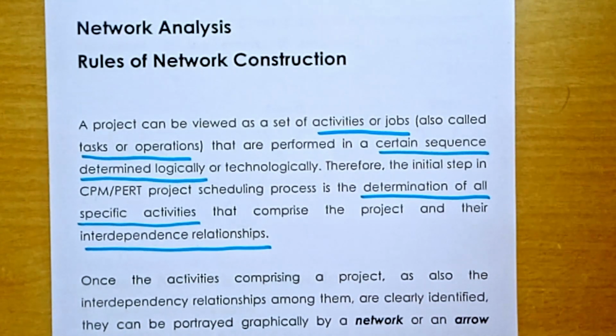Until and unless one activity is completed, you cannot start the next activity. Until and unless the material procurement activity is complete, you cannot start the laying foundation activity. Until and unless the laying foundation activity is complete, you cannot start laying the pillars. You cannot start the activity of casting the roof. You cannot start the activity of raising the walls. So, interdependence of relationship has to be established.